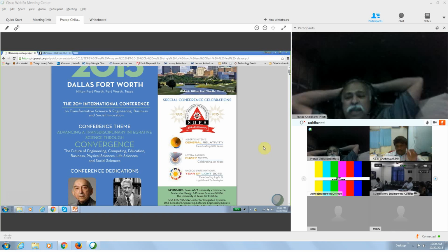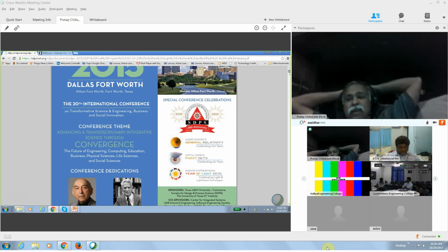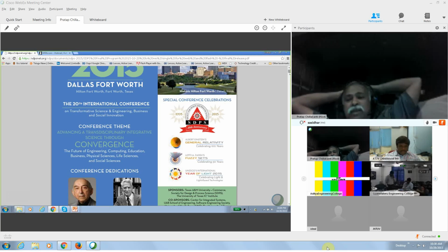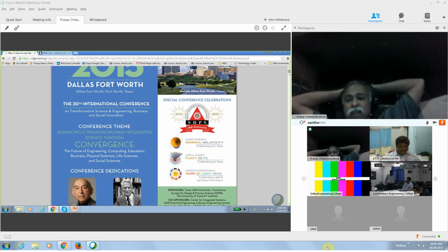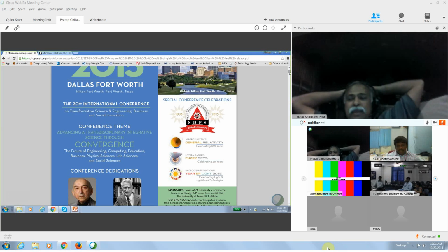Yes, sir. See, the higher the risk, the more deliberate the process becomes. Deliberate meaning we spend a little bit more time, correct? For example, if we are doing drug development, the drug development life cycles in the pharma industry, which is all run through software, have a longer development life cycle because those drugs, when introduced into the market, would affect the lives of millions of people, right? So in those situations, I would be a little bit more careful.